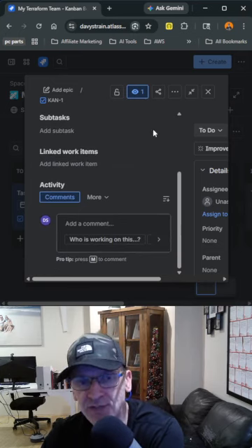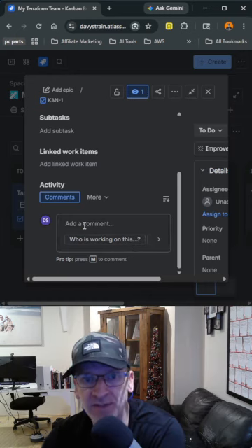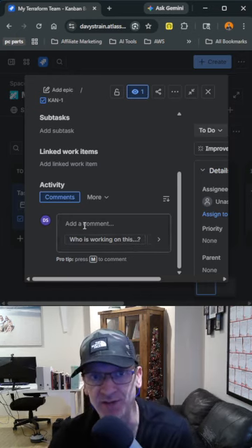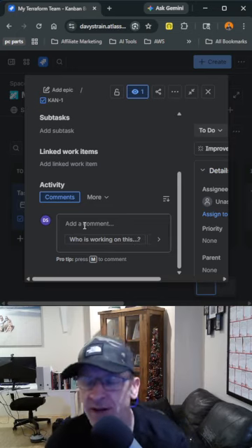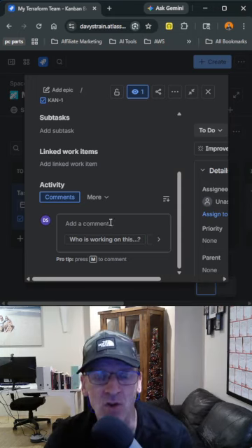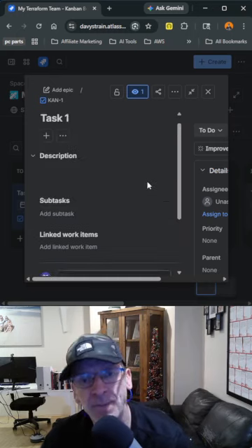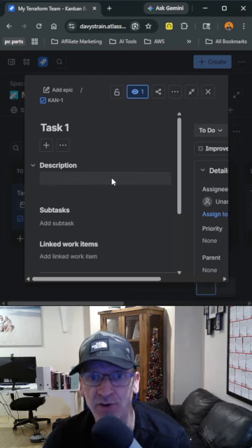If you leave it even for a couple of days before you come back, folks, before you leave it, just put in a comment of the stage that it's at. And at least then when you come back and you might have had the context switch, you can look at the comment and say, oh, I've got to this stage. But again, it's how much detail you put in these descriptions, folks, that'll help you out to no end.